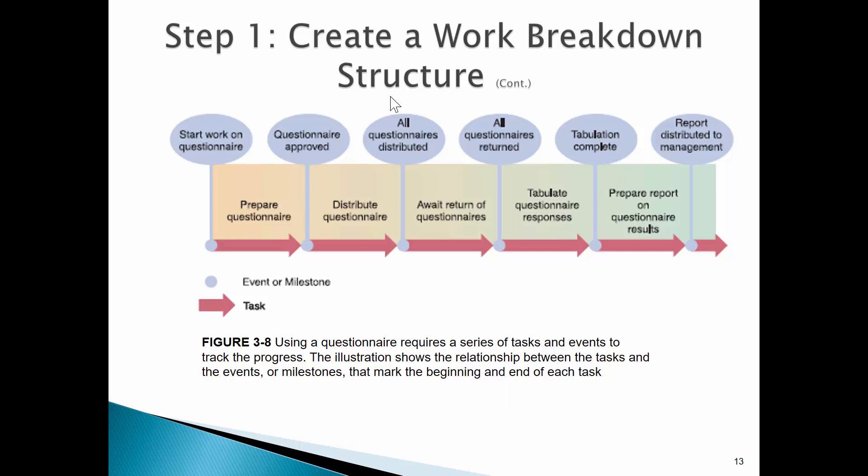Here's an example of a work breakdown structure for a questionnaire, for survey. We prepare the questionnaire, someone approves it, we distribute it. In the case of personal trainer, this might be out to all of the locations. We wait for the return, gather all the data together, tabulate, see what the results are. We may do this graphically. We prepare a report on what the findings of the questionnaire were. Keep in mind, we are focusing on the project, not customer satisfaction.